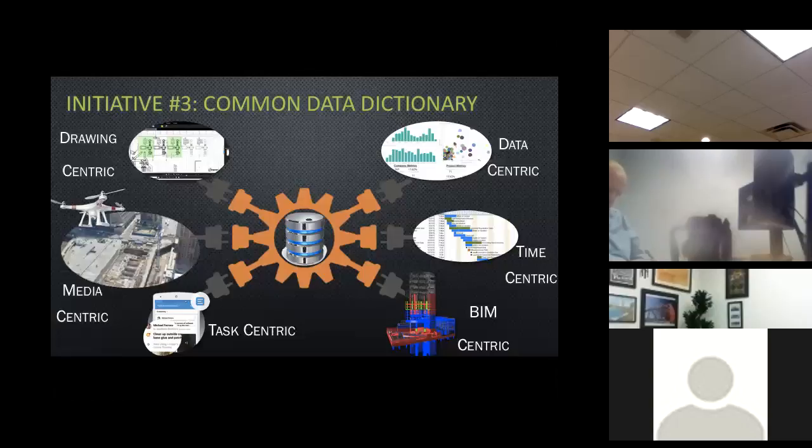But yeah. One of the biggest challenges with the digital submissions is the signature, and what the state boards and agencies of architects and engineers, professional boards, are accepting. Some states are very lax on it and basically will accept any representation of a signature. Some boards have very defined processes, like state of Florida, which is where I am.